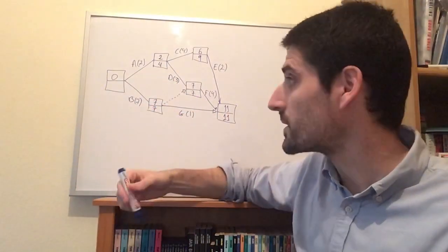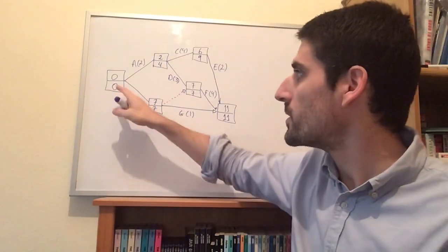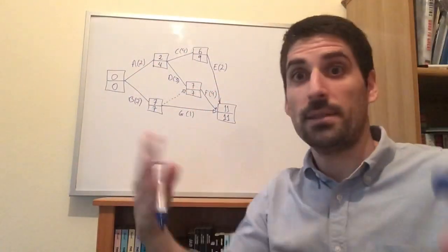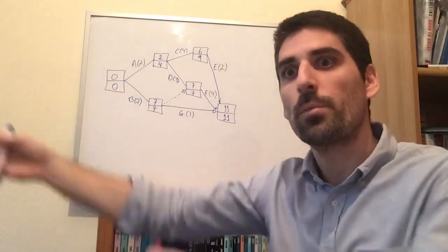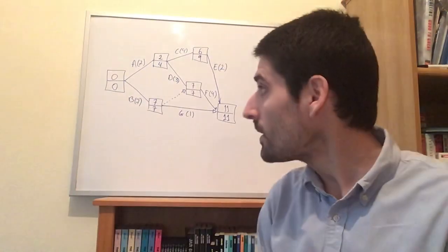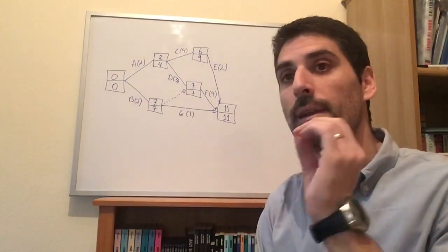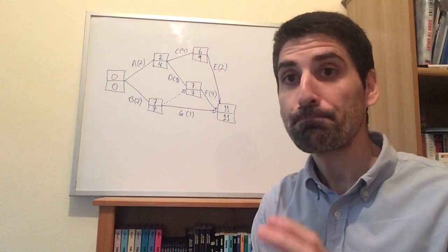I have to choose the lowest out of the two, and that sort of makes sense that I have a 0 there, because if I delay that activity A, I will delay the whole project, won't I? It's the starting activity. If I delay the start, then the completion of the project will take longer. So that's how you perform the backwards pass, and that's how you find the late event time for each activity.